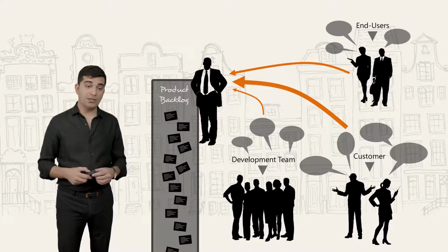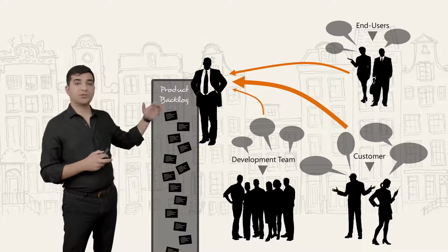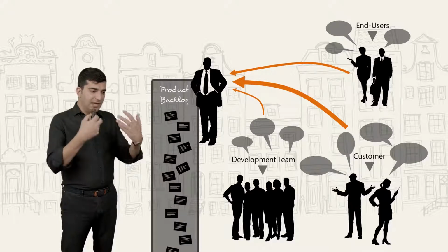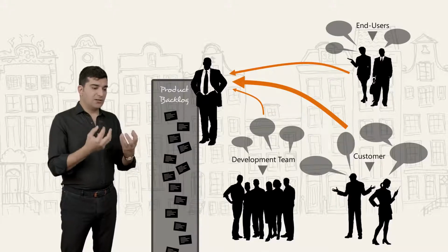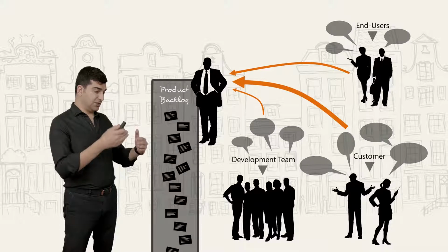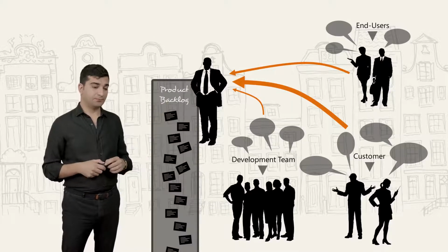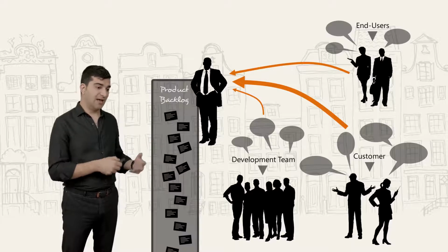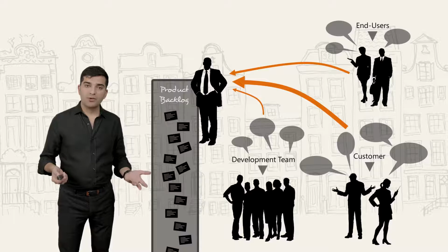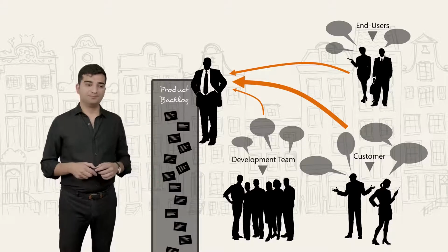And for us, it's much better if we at least start with the most important things, because those things will help us find our way throughout the project. For example, if we decided to stop the project earlier than we imagined, then we will have the most important items. So, what are the most important items? Those that generate more value.